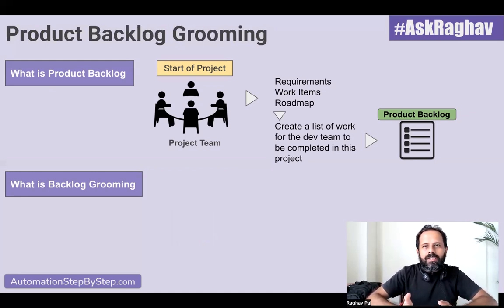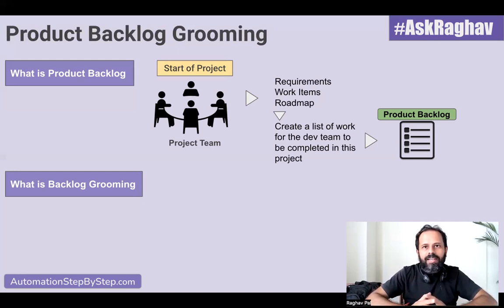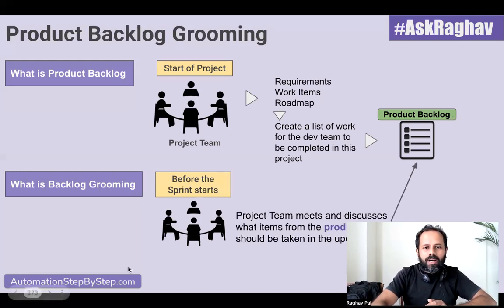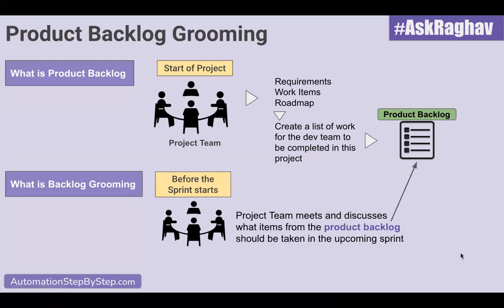The teams decide, out of the complete list of requirements, what things they can cover in this sprint, and then they take up those particular items from the list and work on it. So before the sprint starts, the team meets and all the stakeholders meet, and then they take up the items from the product backlog that should be completed in this upcoming sprint. And this is called product backlog grooming or backlog grooming.